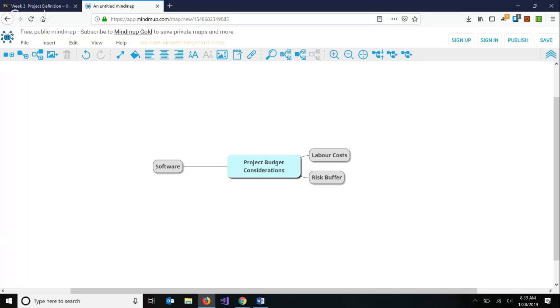Okay. Right. There's a famous saying, not necessarily in web projects, but in any kind of sales: under promise and over deliver. Rather than promising your customers everything and setting expectations really high, which makes them difficult to meet, we're better off, for example, if we think we need 2 weeks, to tell the customer we need 3. That way we're building in some time for contingencies to handle unexpected events or problems. So that's probably a good idea, some sort of buffer, right?